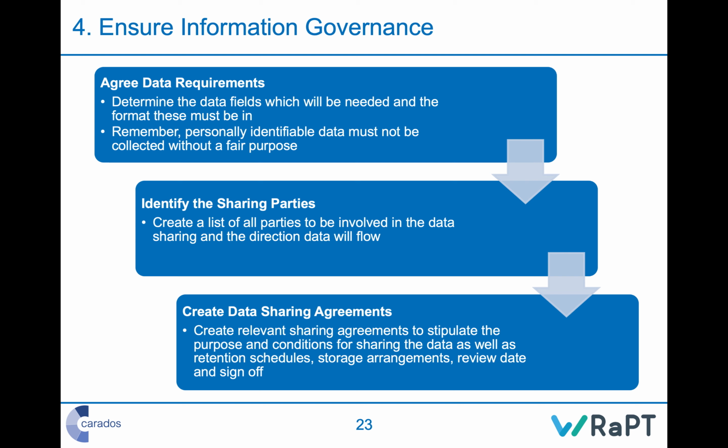The key thing is information governance. If you are going to be collecting patient or workforce data, which you are, you really want to be engaging with the information governance leads in the system and in each organisation early to understand what you need to do from an information governance point of view. So you do need to think about what data you need, and this might mean you have to do the next stage first, thinking about what data you need, and why you are collecting the data.